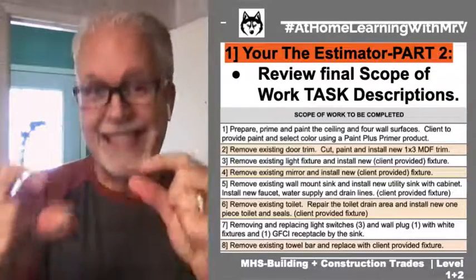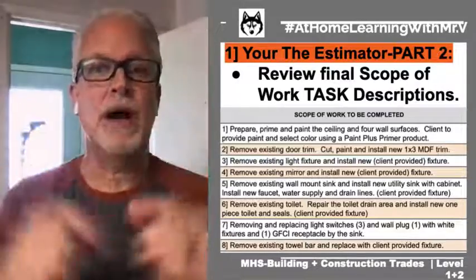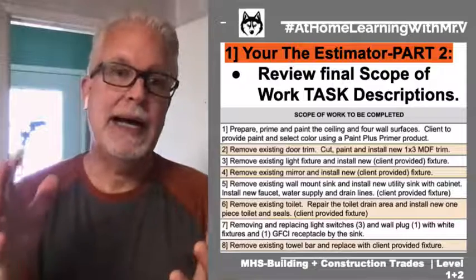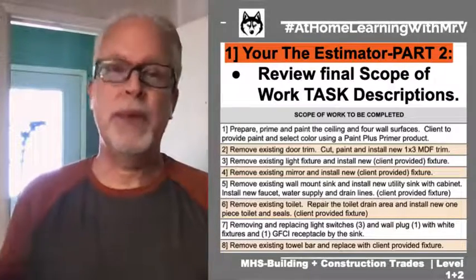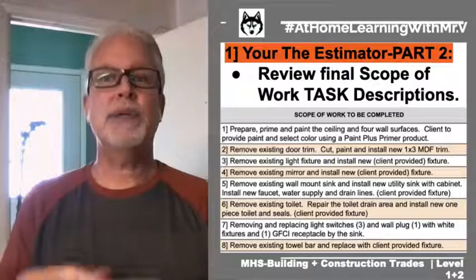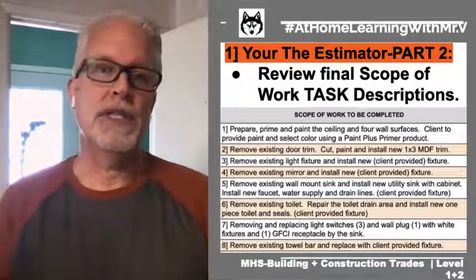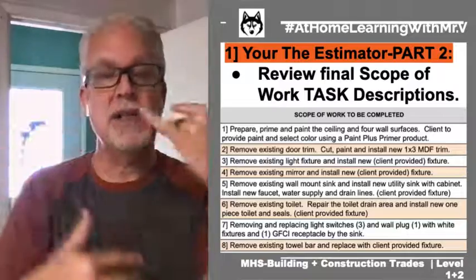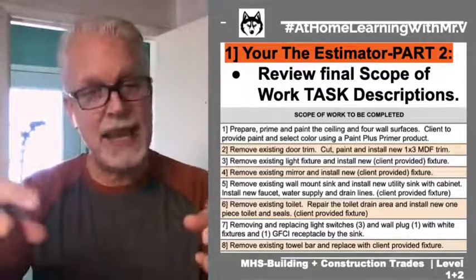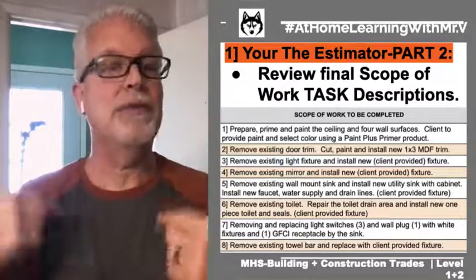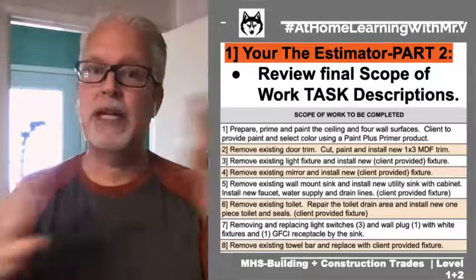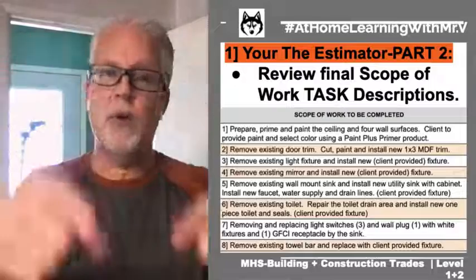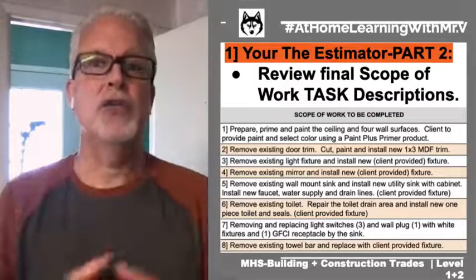Therefore, the more detail we can put into our scope of work, the better off we are as we're moving forward, because decisions have been made, people know what they need to do, and as we're going to find out, there are a lot of materials and products that the client is actually going to be purchasing and providing. That is a term that we use and makes it really clear: is the contractor buying it or is the client buying it? Okay, super important.